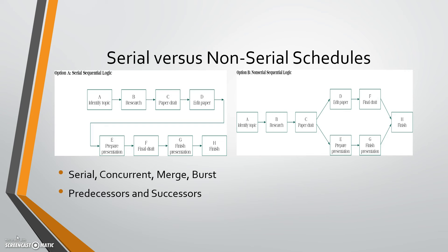A predecessor is something that happens first — or must be completed first — where a successor is something that happens after. In the left picture here, you must draft the paper before you can edit the paper. So C is a predecessor to D. Likewise, D must happen after C, so it's a successor. Predecessor means things that come before, and successor means things that have to follow.